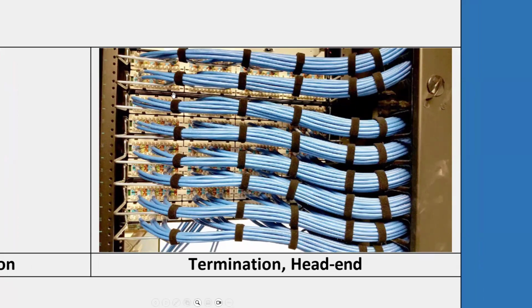And some of the equipment racks have 2 tiered patch panels, so they're kind of like in a V shape. So you get left and right, and so you're going to pre-plan the bundles for left and right, and make sure that all the numbers are there. Because if you're missing one here, or if you're missing one here, all the other ones are going to be affected if you have to correct the number of wires in each bundle and the proper numbers that have to go there.